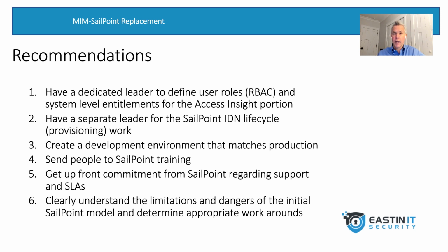There's a lot of moving parts there on the role management side and a lot of negotiation with the business. So don't neglect that. Make sure that you have a strong leader to be able to help you with that. You also want to have a dedicated project manager to handle the lifecycle management side of this. And essentially, that's the provisioning, deprovisioning, the account creation, and Active Directory and Epic, getting data out of PeopleSoft, all that good stuff. So the lifecycle management is really a discrete and separate pillar to the role-based side.